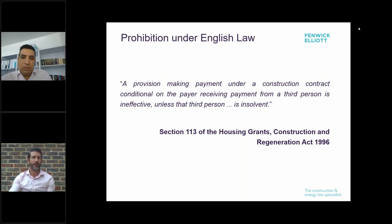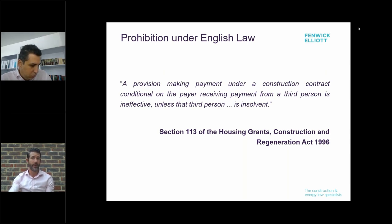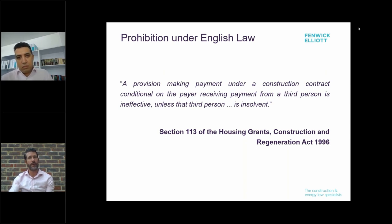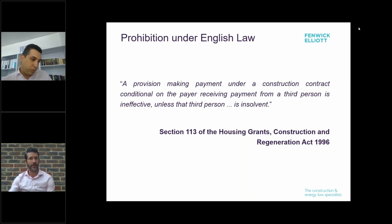One final point: the provisions of the Construction Act apply specifically to construction contracts for works carried out in England, Wales and Scotland. This means two things. First, if you have a subcontract for works performed in England and you've negotiated that it will be governed by the laws of another jurisdiction, section 113 will still take effect and any pay-when-paid provisions will be deemed ineffective. Second, if you have a project in another part of the world and agreed to have the contract governed by English law, these provisions will not apply. So if you have a Middle East-based project with an English law provision and a pay-when-paid clause, section 113 will not provide the subcontractor any protection.